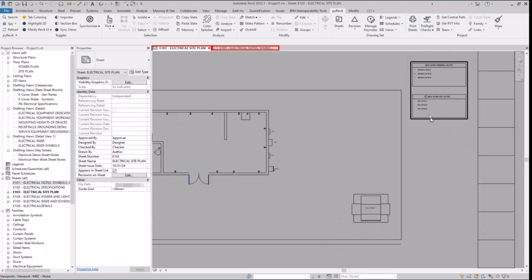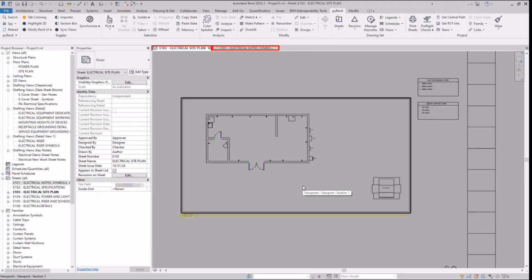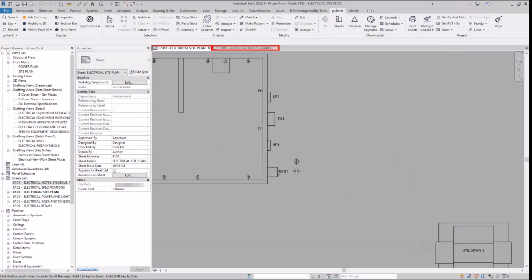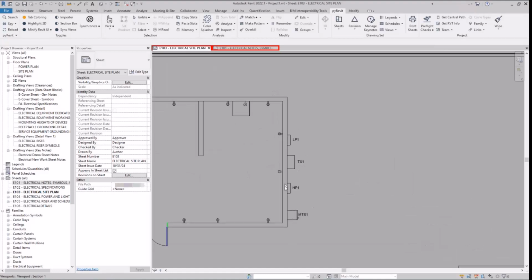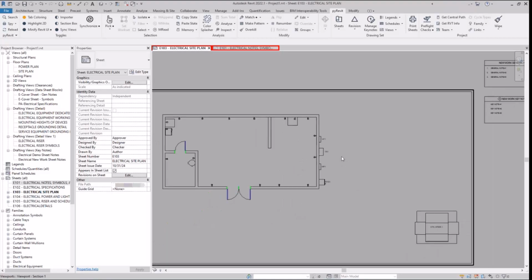So the key notes, specifically for people on YouTube, are, okay, great, you have this picture. It's worth 1,000 words, but you still kind of need words. What are we doing? Who's buying this utility transformer? Who's setting this thing? Who's providing the pad underneath? Who is purchasing this? Is it the client? Is it the owner? Is it the EC? Is it the engineer of record? So that's where a lot of those key notes come into play.